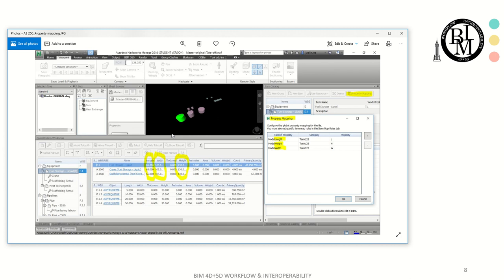Where do we count their cost for this quantification? That's where virtual takeoff comes into play. Once you start the virtual takeoff process, it's going to be added to the resource catalog, and you can utilize that to do further quantification.